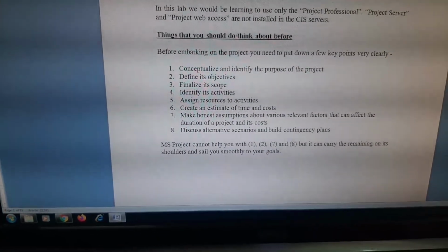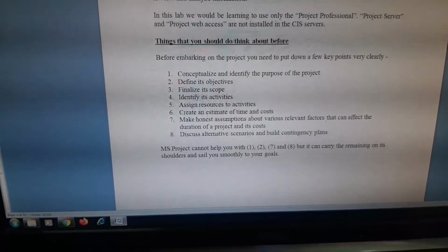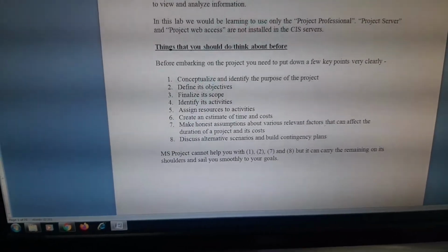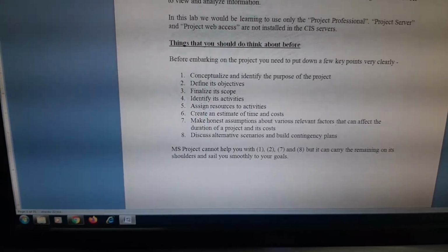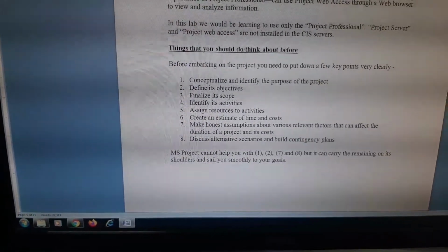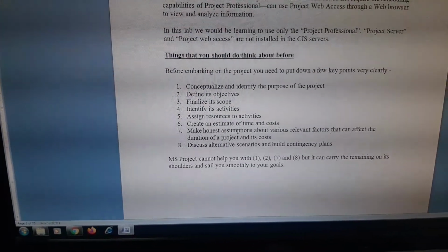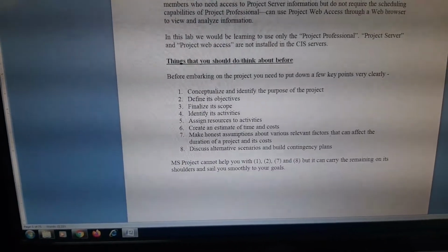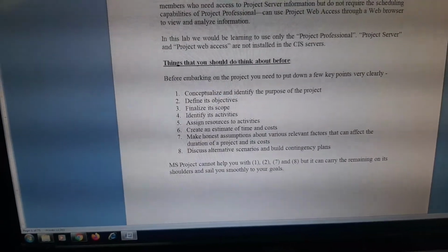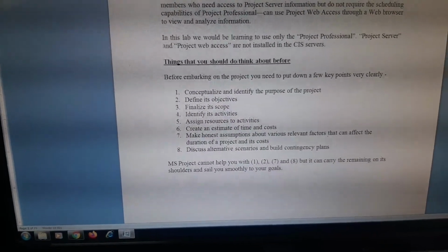Next you need to find out the estimate of time and cost. It means, suppose you are doing earthwork excavation, how long does it take, how much does it take; you have to do these estimations. Once you have done a time estimation, you need to do a cost estimation also. What machineries you use for the excavation and what manpower you use for the excavation, all this cost you also need to estimate.